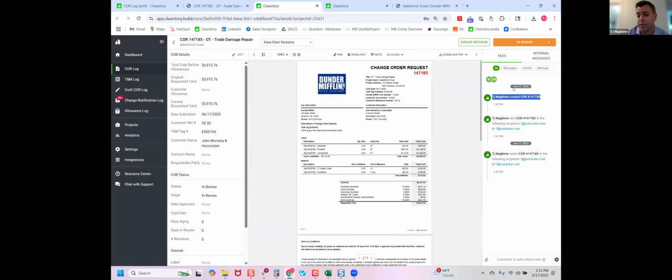So this is truly going to show you, hey, on June 17th at 1:55 in the afternoon, me, TJ, I created this. I sent this over to these two people over at my general contractor. And anytime somebody opens this, makes a comment, does a markup, changes a status, that history is all going to live here. And every single piece of it is going to have a date and a timestamp, which just becomes super valuable when it comes to closeout, especially on long-term jobs.